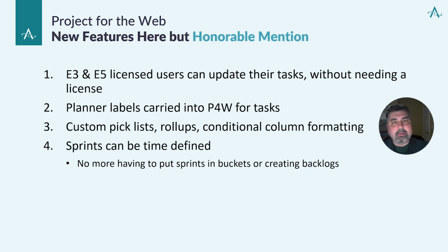Think of it like they're going to come in, progress their assignments, and put in the actuals, or put in the work. But they are not actually building and managing the schedule. They're progressing their assignments, or the work that happens to be there. Again, Microsoft has removed the license restriction to allow more people to come in quickly and efficiently and progress that schedule, but not have control of that schedule like you would if you had to share Project Desktop.